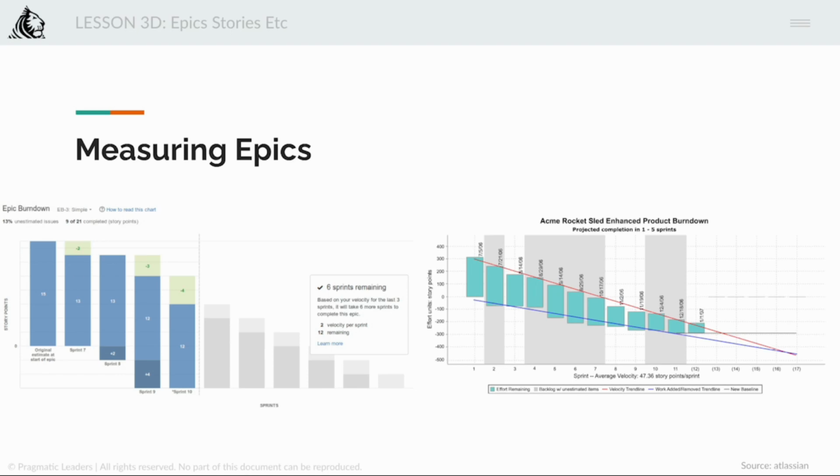For example, if the team is delivering a new website for the company, scope creep would be asking for new features after the initial requirements had been sketched out. Correct? So while tolerating scope creep during a sprint is bad practice, scope change within epics and versions is a natural consequence of agile development. Getting my sense? So there should be no change inside the sprint. If you're getting a new task, don't add it to the sprint directly unless it is life threatening. It's critical. For example, the site went down, site crashed, or something happened. Obviously, if something like that happens, that takes the precedence. But unless it's a life and death situation, the sprint should not change.